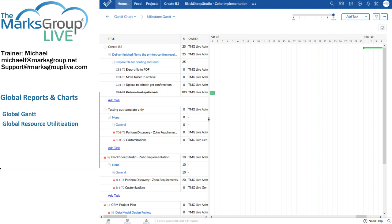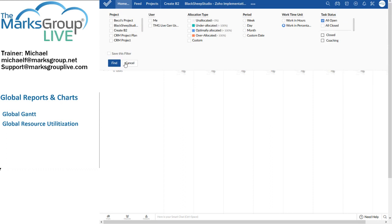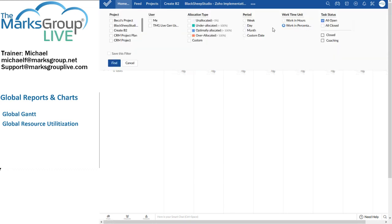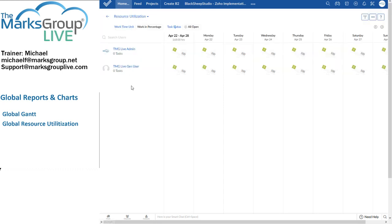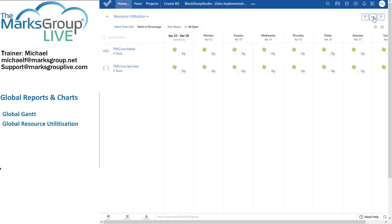This shows you each project team member and how much of that team member's time is being utilized. I can set the work time unit. So, I can set that to be working hours. I can set the task status to show me all open activities or closed activities. I can filter my results to see a specific view, again, using that great funnel that's over there.